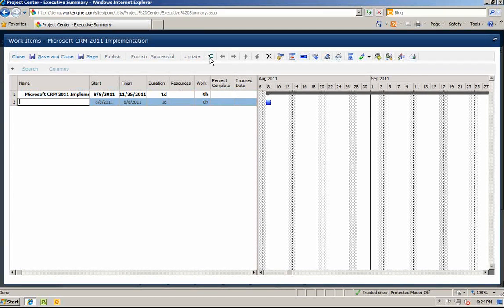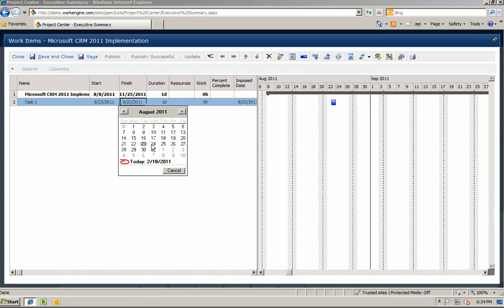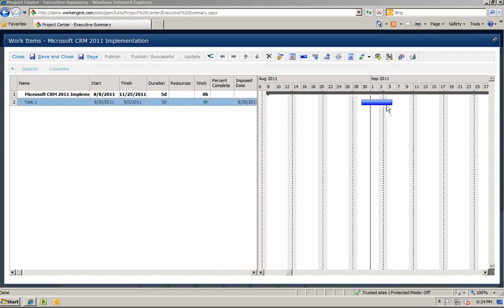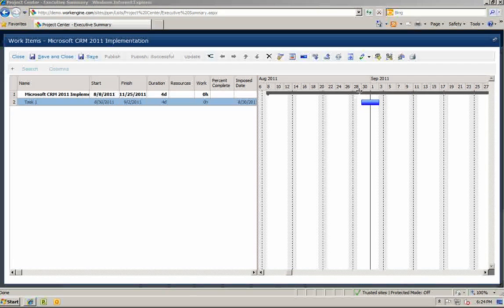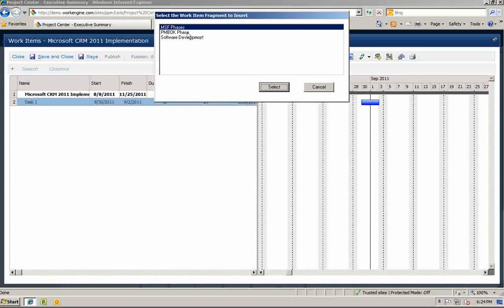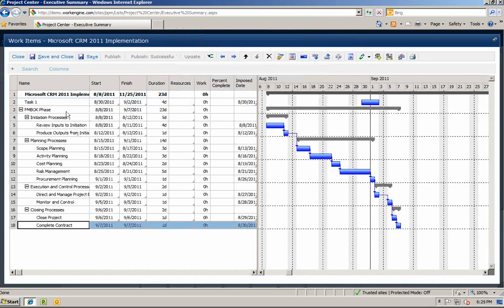First, you can build the work plan from scratch by entering your task, your estimated start date, your estimated finish date, your duration — or you can use the dynamic Gantt chart controls to move the dates forward or backwards or expand or decrease the durations. You can also pre-populate the work plan using pre-built templates, or create templates in fragments allowing you to select certain phases or a combination of templates.